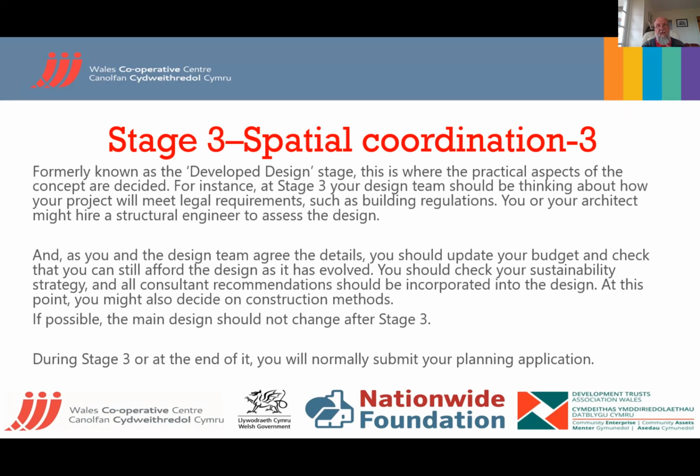And if you do design and build with a contractor, they will what they call re-engineer the scheme to do it a slightly different way to get the same output as you want, but maybe a different method. And it could be cheaper or quicker, more energy efficient, but you're not going to be changing it after stage 3. And say at the end of this, you will submit your planning application. So any queries on that bit?